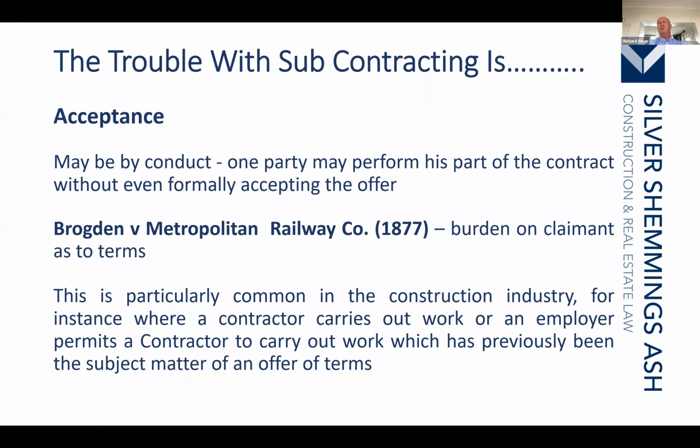But then the argument goes, but you've continued. But that's not going to be sufficient for acceptance, because they haven't changed their position. And silence is never acceptance. So if you've issued the subcontract order after the subcontractor starting on site, you have to show that something the subcontractor has done indicates that they've accepted.